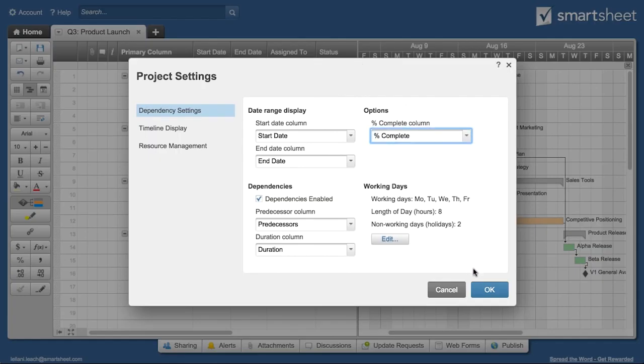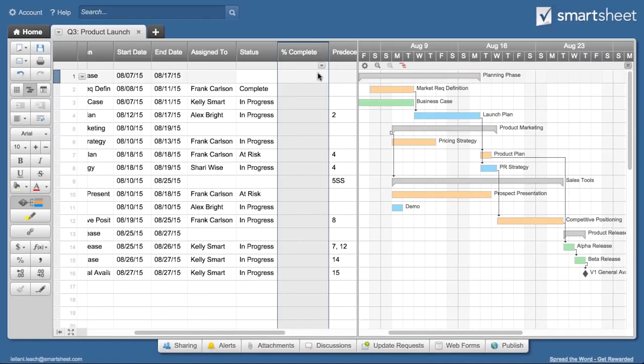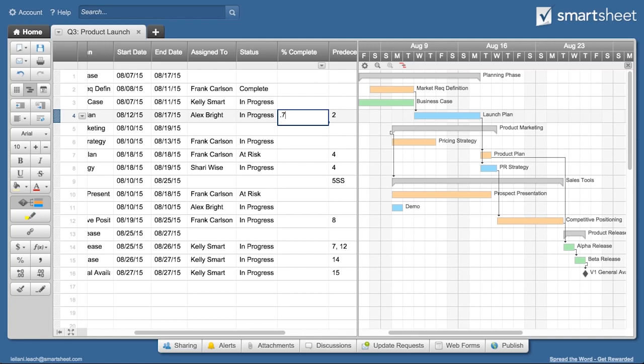Then ask task owners to update the completion percentage so you always have the current status. Smartsheet automatically calculates percent complete of the parent task.